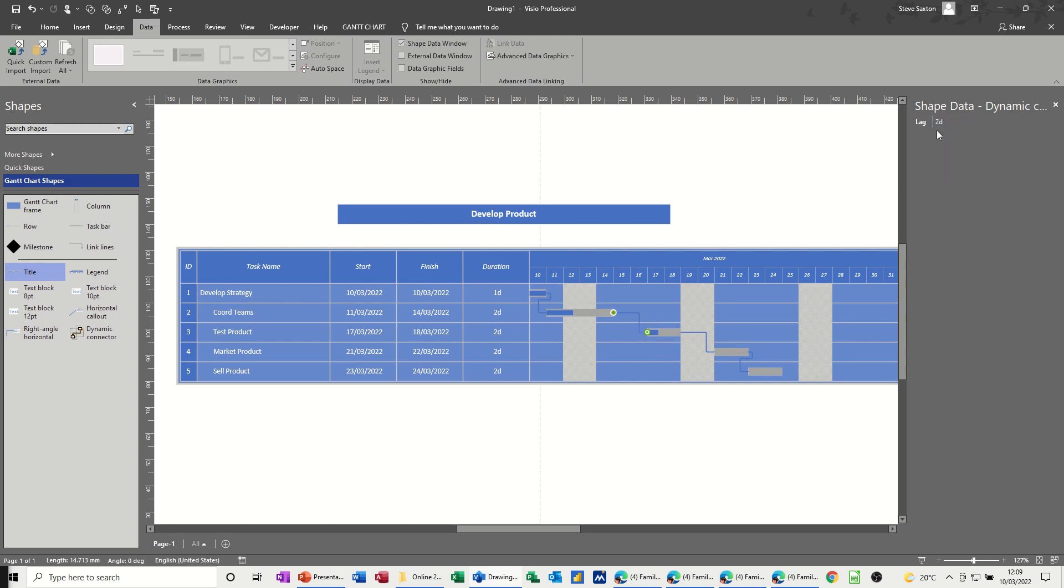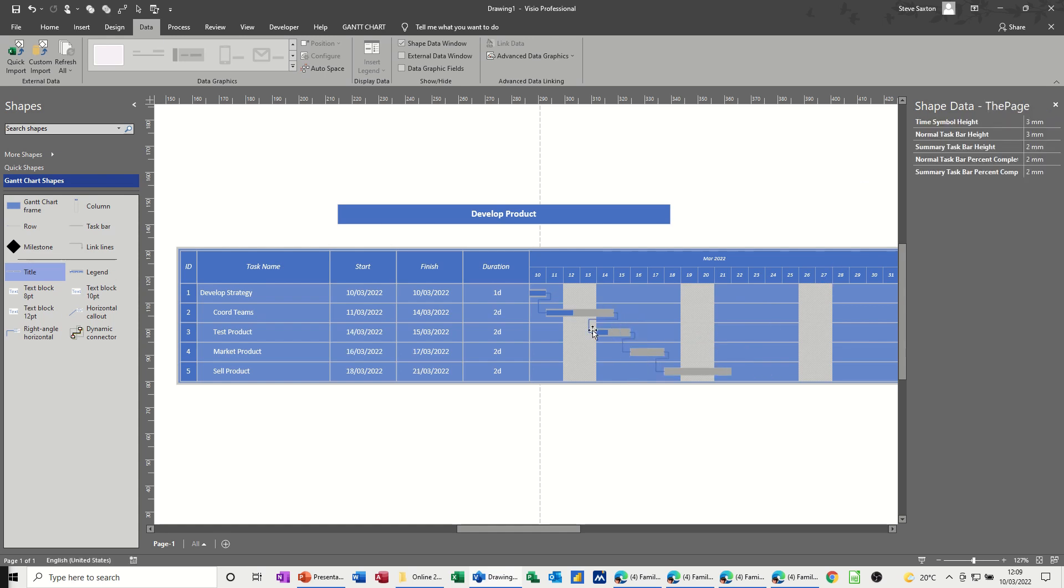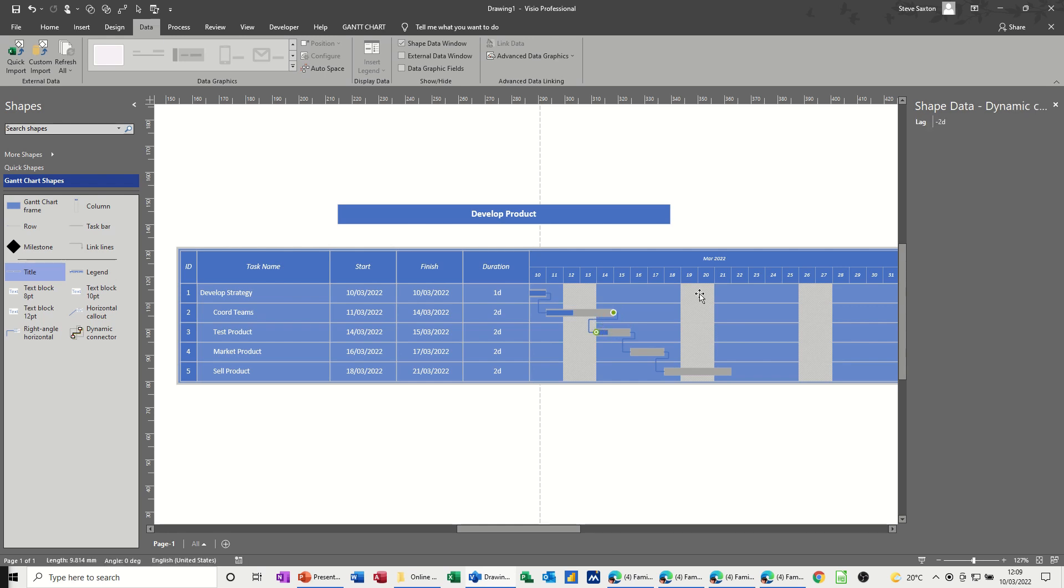If I click back onto this, and put a minus two days on that, oops, minus two days. What you'll get is a lead, so it comes in, it's a lead time. So you've got lag or lead. If I put that back to zero, zero, which was the default, it should just follow on.